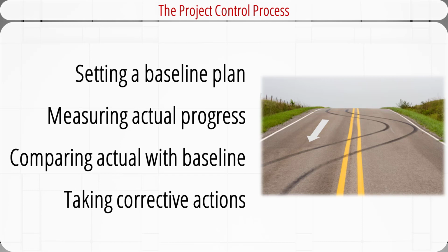First, set a baseline plan for the project. The baseline is derived from the cost and duration information found in the work breakdown structure, and time sequence data from the project network and resource scheduling decisions. Second, measure actual progress and performance of the project. Time and cost are quantitative measures of performance. We will soon learn another concept called the earned value, which provides an estimate of performance against a time-phased budget. It's defined as the budgeted cost of the work performed.